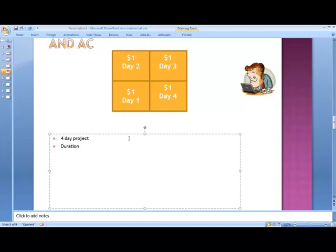That's where we plan the value of the work that we're going to get done. So we're going to say that by the end of day one, we would have gotten one dollar worth of work done. That is really our plan value. When we think about the time frame and the value we're placing on that work, we're talking about the plan value. Plan value for day one is one dollar.